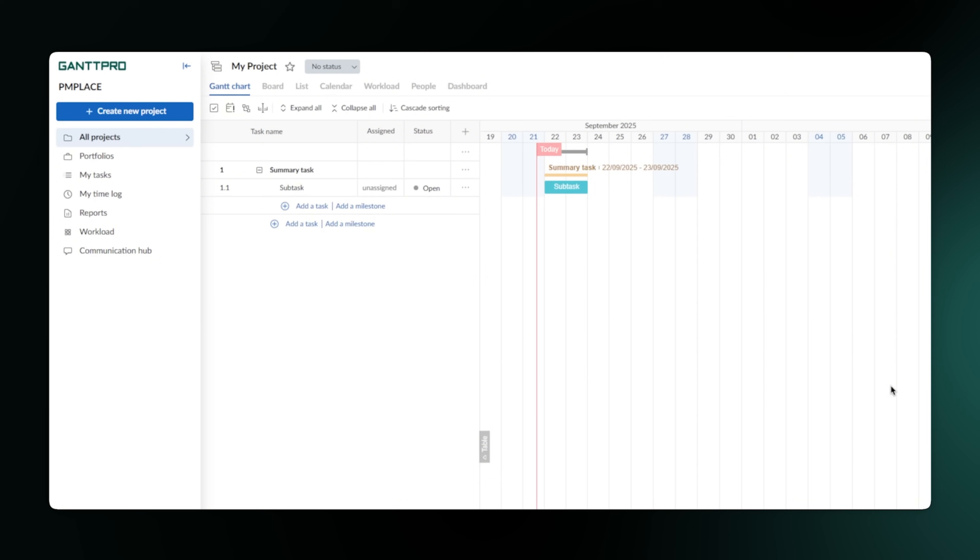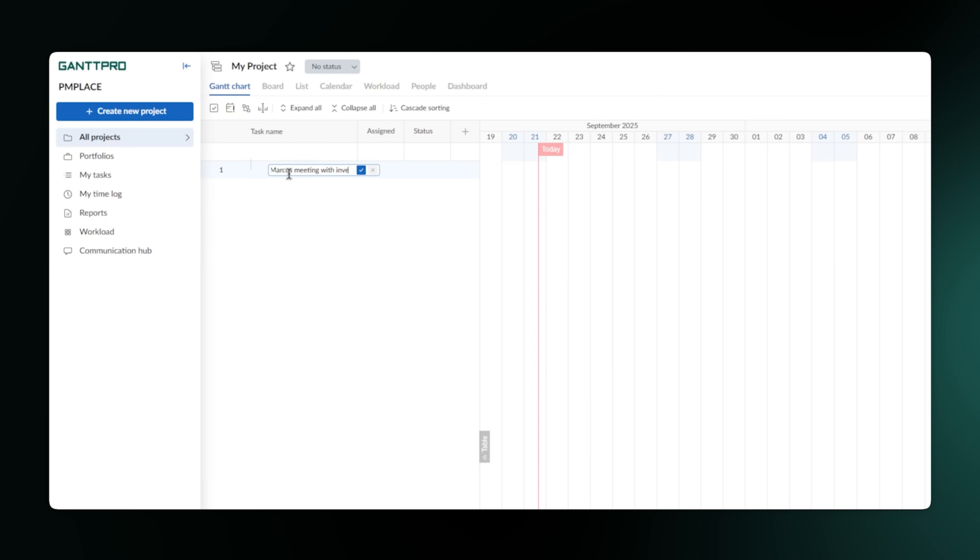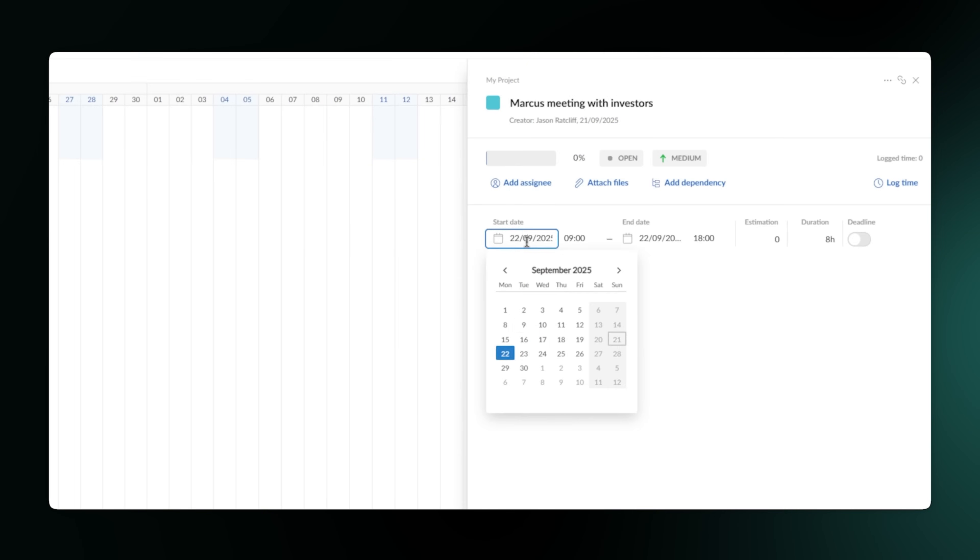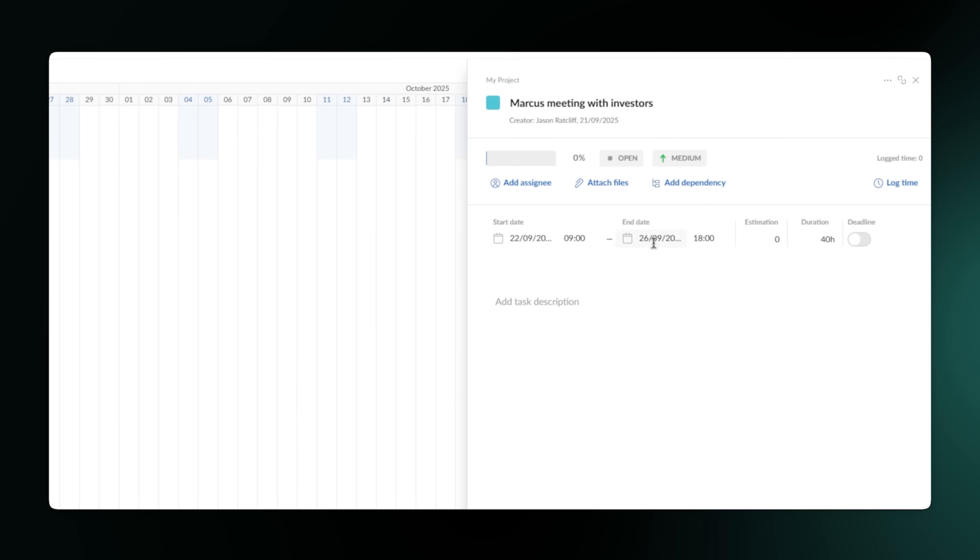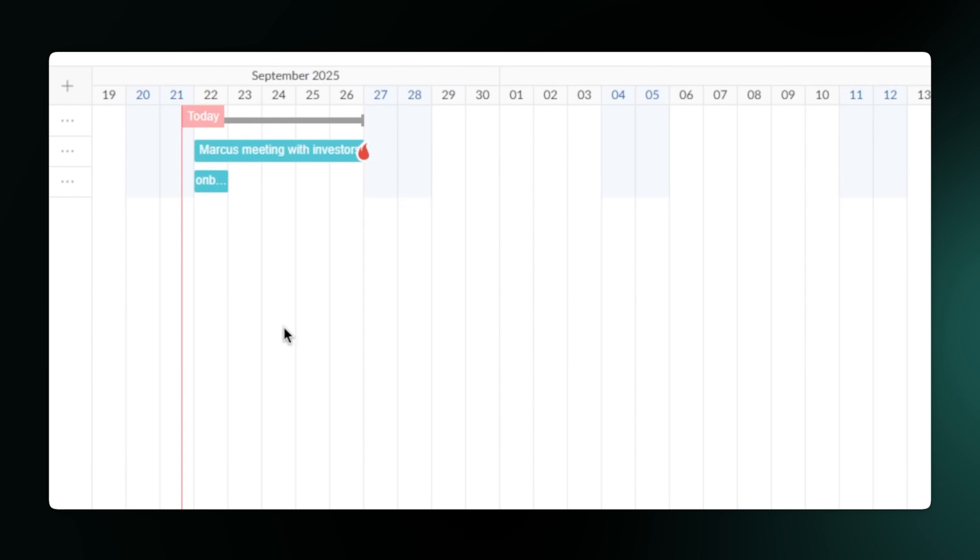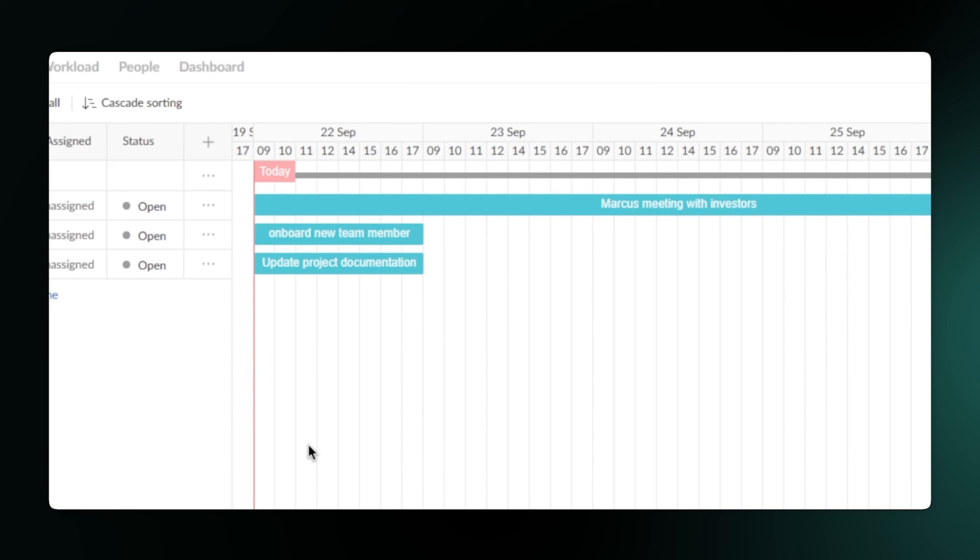Once your project is created, the first thing you'll notice is the Gantt chart. This is a super powerful way to visualize your project. You can add all your tasks right here, set a start date and a due date. But what makes it so useful is how you can link tasks together.